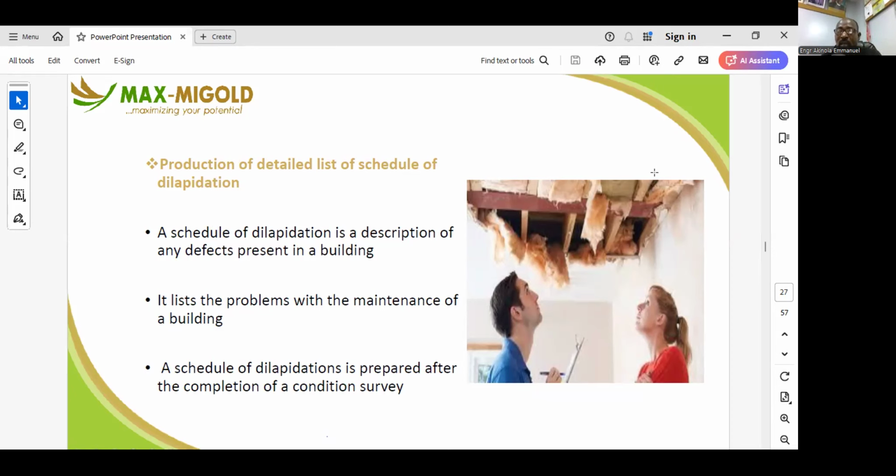according to its usage. And it is expected of the lessee to ensure that when his tenancy period expires, he restores that property back to its original state before the rental took place. And this is where the schedule of dilapidation comes in. And when it is 18 months to the expiration of the lease period, you have to conduct another assessment so that you send out a reminder to the lessee, notifying him that there is need for him to return the property back to its original state before it was rented to him.